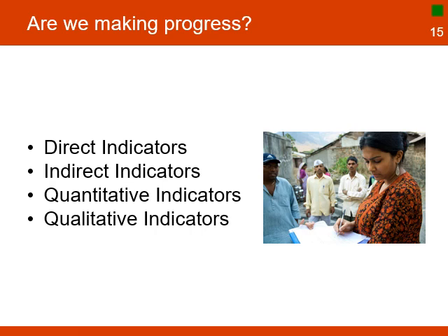Indicators can be direct or indirect and qualitative or quantitative. Direct indicators are the data that the project will collect. Indirect indicators are the data that was collected by an institution, another project, or come from other sources of information. Quantitative indicators describe quantifiable changes such as enrollment, rate, gender disparity, number of persons benefiting from a certain activity. The indicators are observable and respond to questions such as how many, how much, and how often.